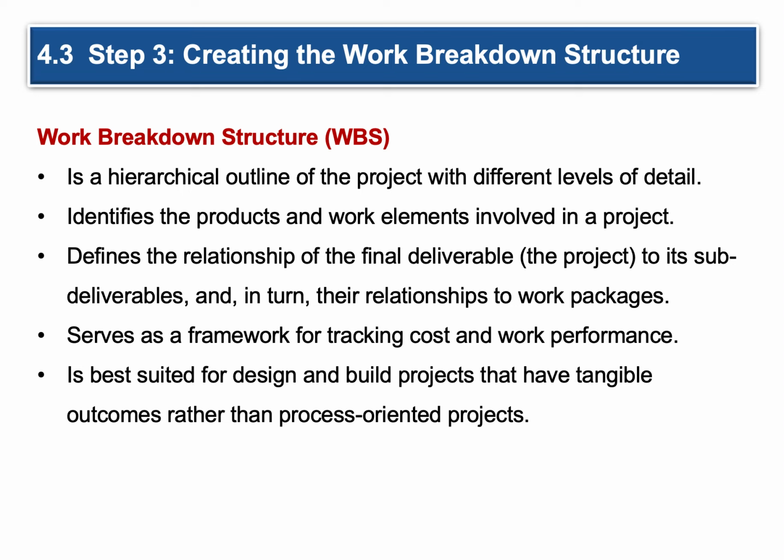What does each person do and why do they do it? Serves as a framework for tracking cost and work performance. We'll look at a graphic here in a few slides that makes this a little more apparent. It's best suited for design and build projects that have tangible outcomes rather than process-oriented projects, although I would say processes is great if you can add some structure to them as well.